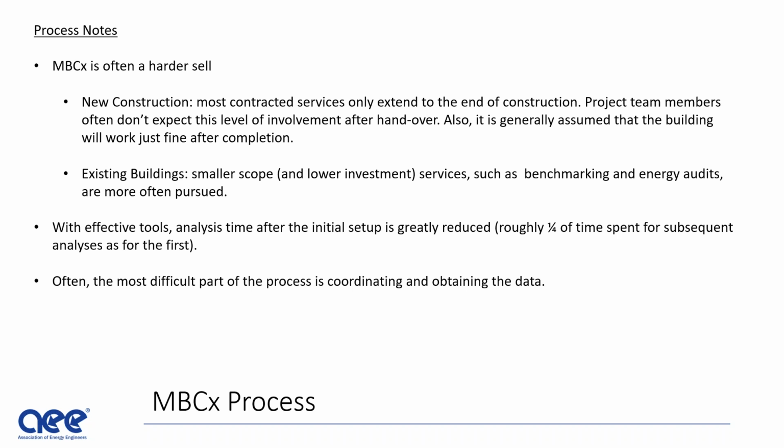It's also effective to do a shorter analysis with only a few weeks of data that already reveals lots, but roughly a quarter of the time spent for subsequent analyses is what's required after you set it up that first time.